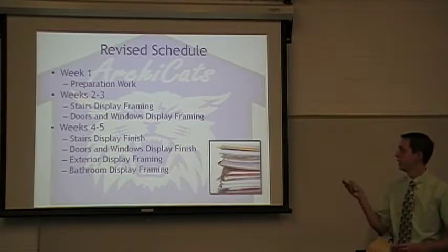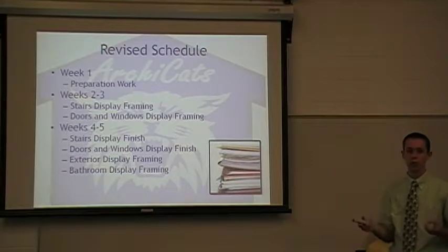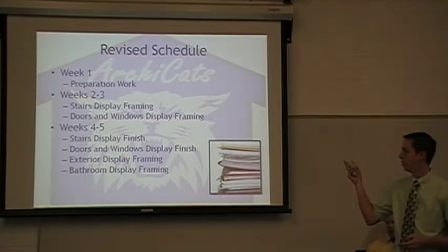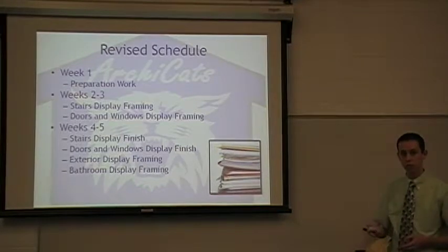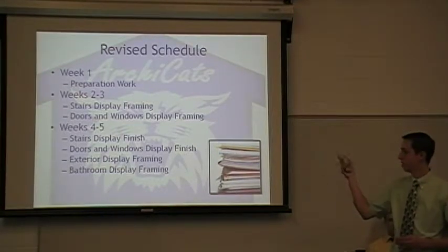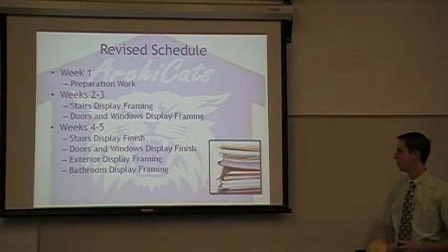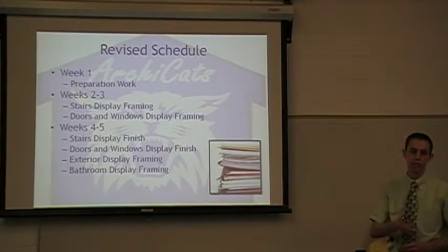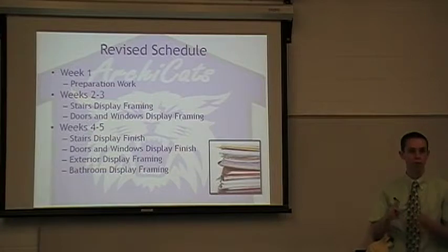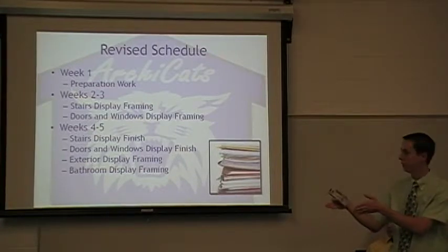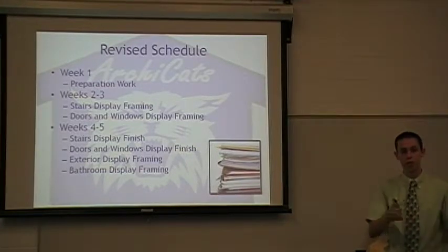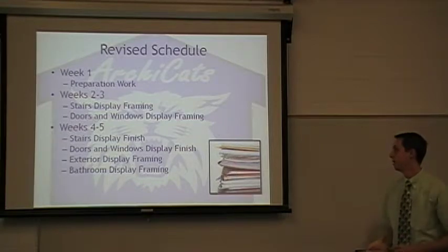Once we started this semester, we revised that to try to hone in on what exactly we were going to do. So we took this approach of maybe starting 2 models at a time, doing the framing the first couple of weeks. After the framing was done, move on to the next couple of weeks. Finish those 2, like the display of the stairs, the windows, and doors. Finish those while the others in the team would start 2 more. And so we'd have 2 or 3 finishing one, and 2 or 3 starting the other one. So we would kind of progress that way.